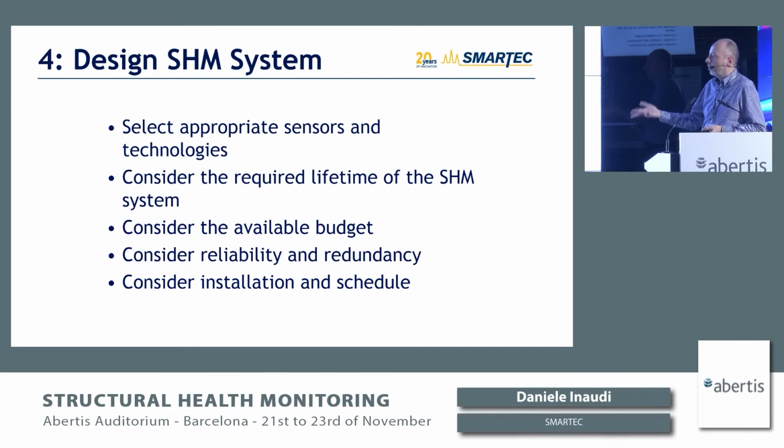This is also where the budget comes into play. And again, it's very useful to have a ranked risk list, because you can start at the top, and when the money finishes, you will need to accept the risk that falls below that line. Reliability and redundancy are also important considerations, and so are installation and schedule.